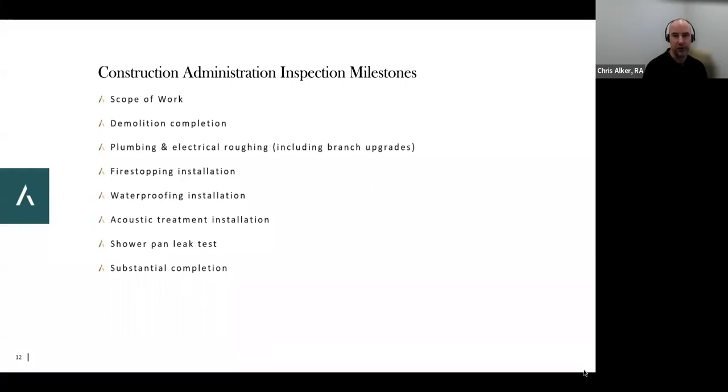And it's also an interesting point of contention, the washer dryer situation, because washers create suds. In some buildings, the infrastructure, the lines, are not big enough to support that type of appliance. So if you're considering allowing everybody in their alterations to put in washers and dryers because it's a wonderful thing to have, we highly recommend that an MEP, also known as a mechanical, electrical, or plumbing engineer, review the infrastructure of your building before you allow something like that. Some people have already done that in their buildings, and in your alteration package, it will be listed under prohibited work. You cannot do that.